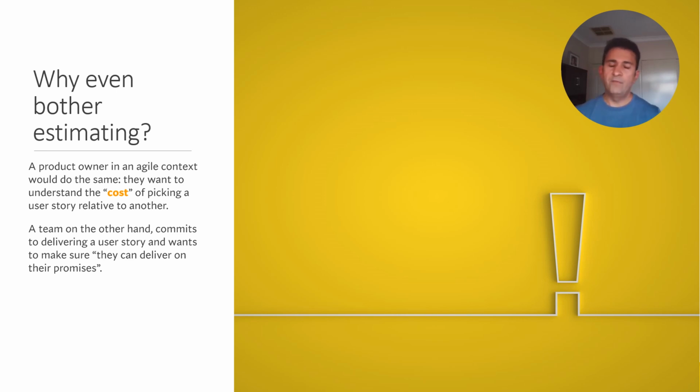We're looking at it, and again, keep in mind that we are classifying the stories into different buckets of cost, of difficulty, basically. And we're saying some of them are pretty simple to deliver, some of them are slightly more difficult, and there may be some that are very difficult to deliver, and that's sort of the cost of delivering them. Combined with the value, that basically gives the product owner enough information to be able to make those day-to-day decisions about the backlog.